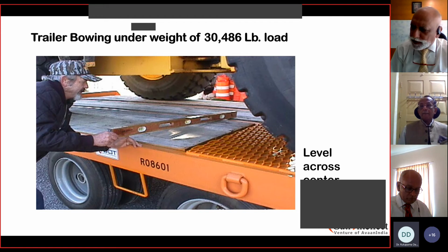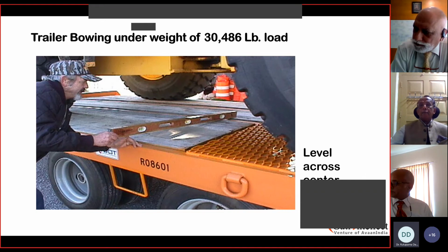If the dimensions are going outside the standard dimensions of the trailer or they're within the limit, all that if it is defined, then the vendor can take up additional strengthening of the trailer so that the equipment or the chassis is strong enough to safely transport the material. Whereas in this case, the trailer is not suitable for carrying the load which is supposed to be transported, because the specifications in the contract were not clearly defined on that. Next one, sir. Thank you.